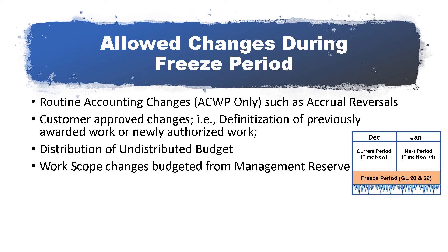Like UB, Management Reserve, or MR, is a holding account for budget. However, unlike UB, the MR budget has no scope assigned to it. When additional scope is transferred to control accounts that is not associated with a change in the contract's budget or authorized scope, the source of that budget is MR. While it is preferred that a change control program identifies scope and budget changes outside the freeze period, it is permissible to make freeze period changes if that work scope needs to begin in the freeze period.